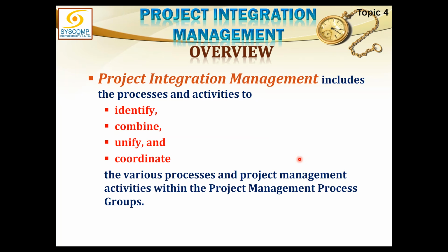Yes, it will identify those things which have to be put together for implementation or execution purposes. As you remember, we said that all the management plans and all the baselines have to be put into a project management plan. Whereas we have separated the project documents because those were good enough for creating the baselines or creating the overall project management plan, but they were not contributing towards the execution. So the identified items which are useful for execution have been separated, consolidated into a project management plan, which will then be the reference point to work on.